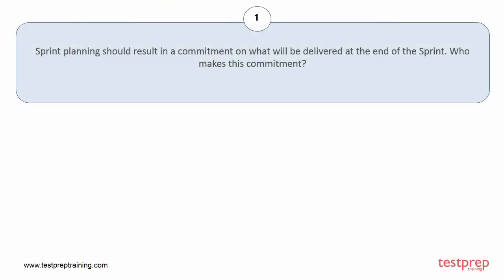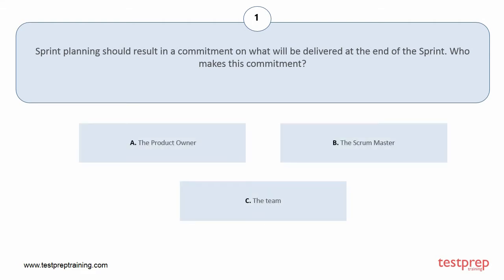Question number 1: Sprint planning should result in a commitment on what will be delivered at the end of the sprint. Who makes this commitment? Your options are: A, the product owner; B, the scrum master; C, the team. The correct answer is option C.